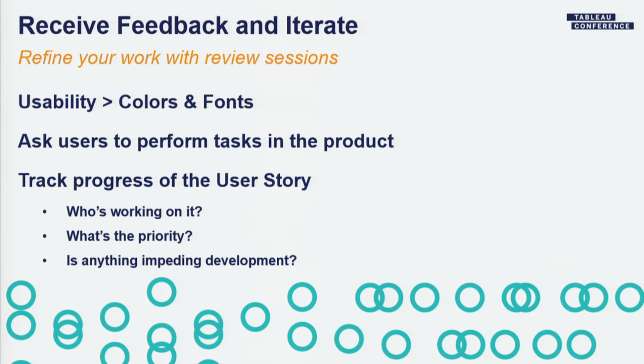This is just the creative process at work. So tell them to reorganize the priority for you. Hey, got it. So 3, 4, and 5, we're going to change this to 7, 8, 9, and 10. What do we work on first, right? Are we good with that? Got it, right? Have them tell you what they want. They should be driving the priorities, and you're executing as best you can against those priorities, right?